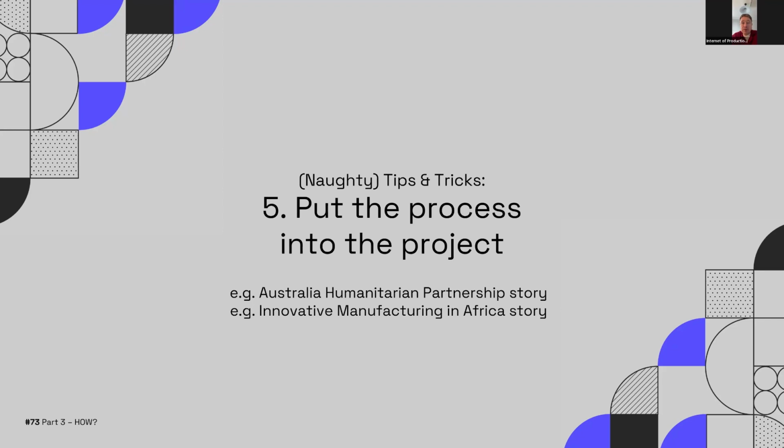So if you haven't got time to do the research needed to design the project before you apply, or quite frankly, and time is money, if you haven't got the resource to do that, put it into the project. And I've done that with this project, with RISA. I've literally said with this project, we're going to prototype something and then scale it up. The prototyping will help us figure out how to scale it up. We'll do it with one makerspace first, such as onboarding DTI to the SeekMake platform. Once we know if it works and how that works, we'll do it with the other makerspaces. Put the process into the project.